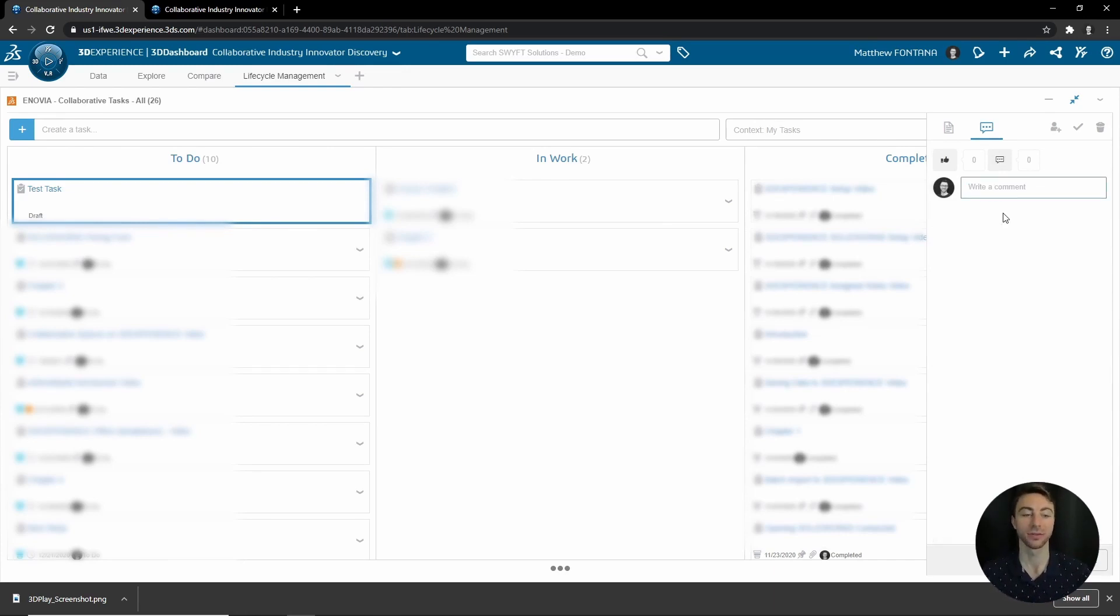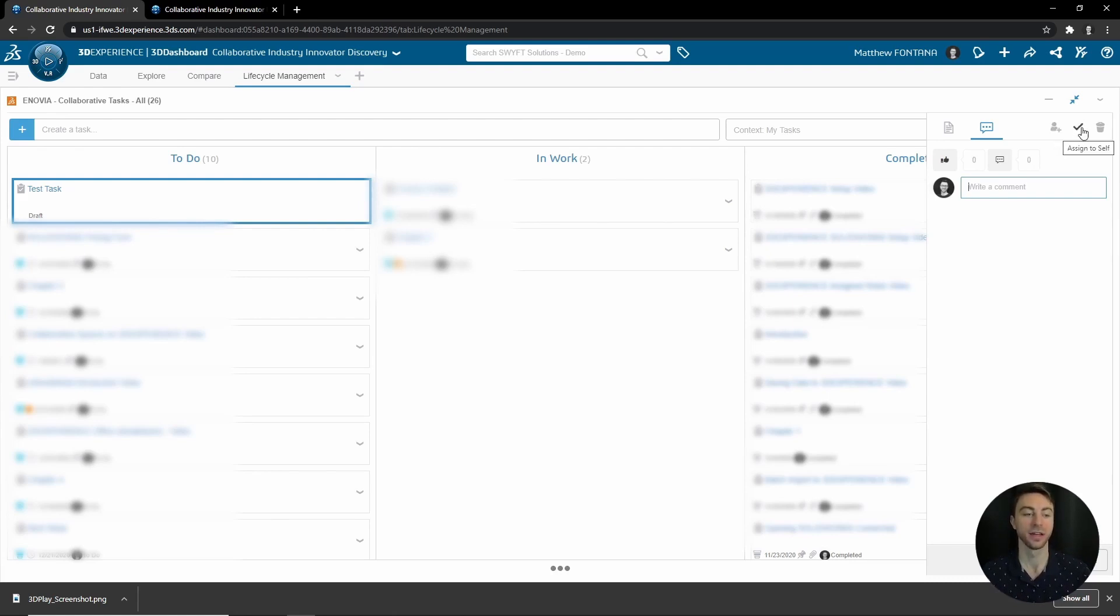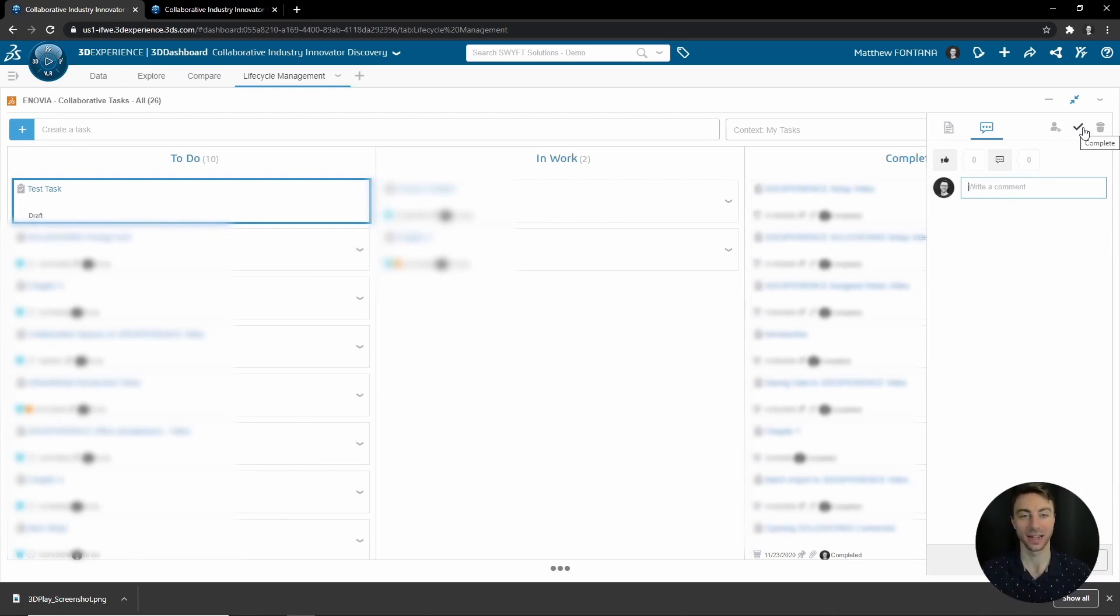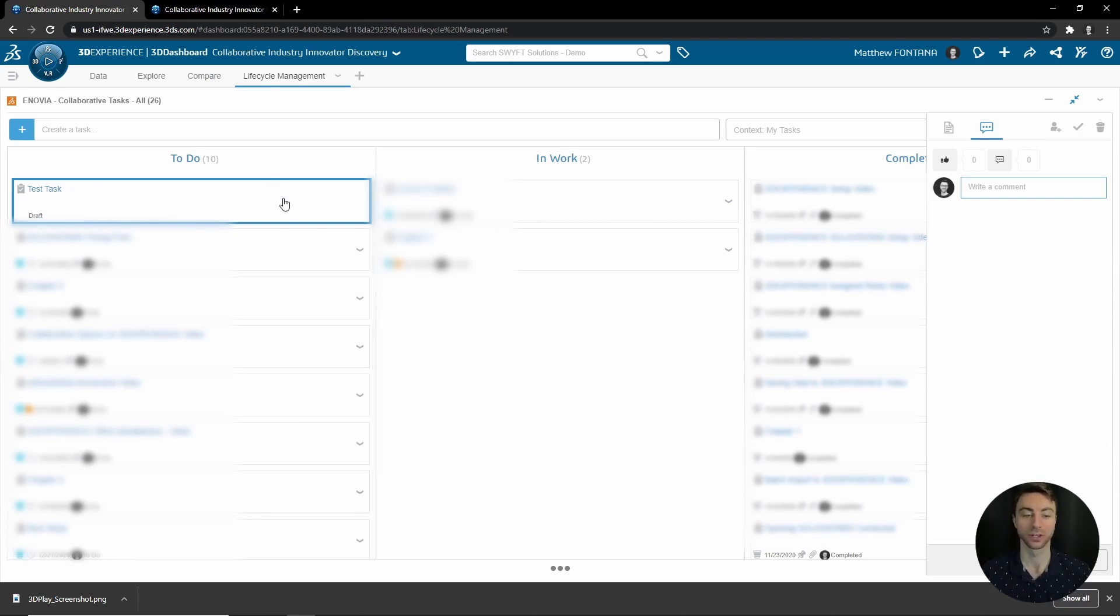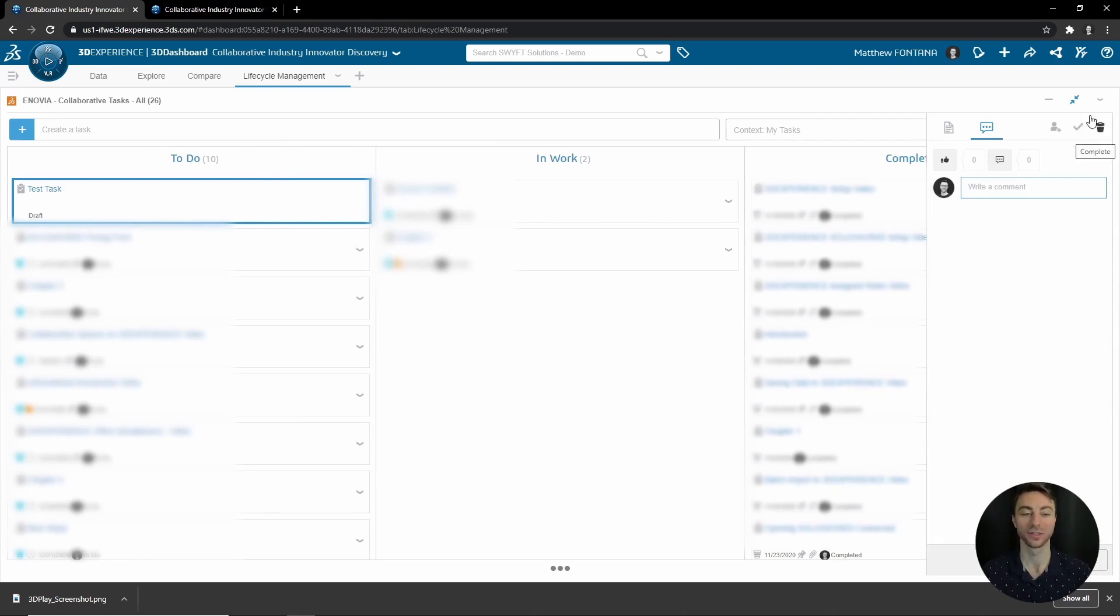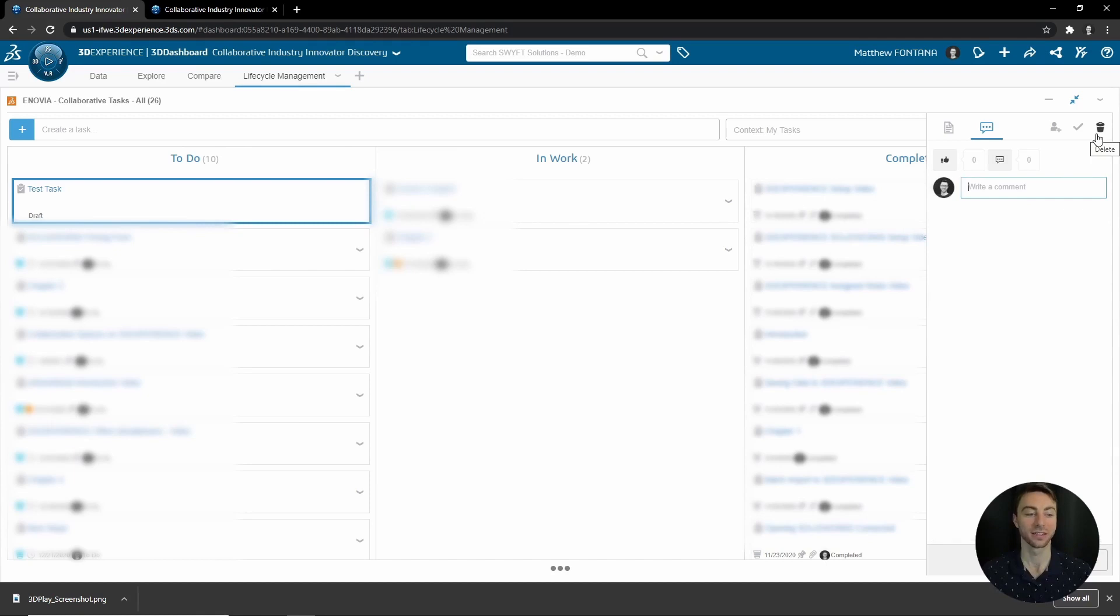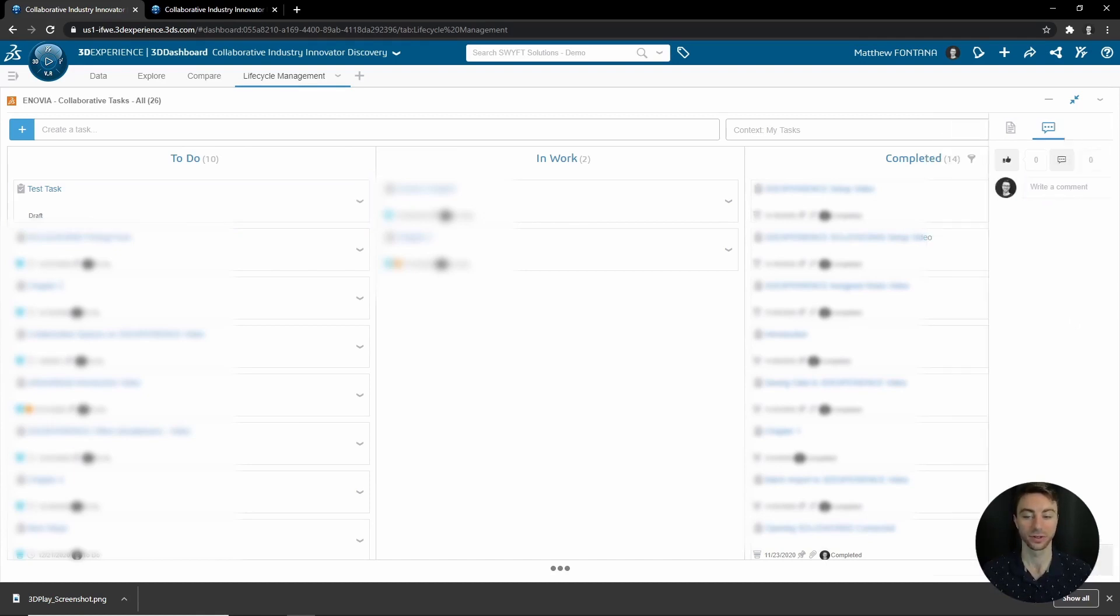As mentioned, you can assign it to yourself. And be careful, this gets me a lot of times. This isn't to exit out of the task pane, this is to complete the task. So this will move the task all the way from Draft or To Do to Complete, so be careful with that one. I tend to close out. You can always click and drag it back if you need to. And then there's Delete if you want to delete the task.